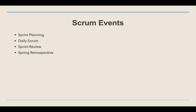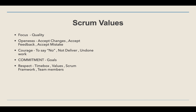The fourth ritual is the Sprint Retrospective, where we analyze what went well, what we can improve, and what unnecessary things we can remove. If we are planning any improvements, we create action items and put them in the backlog, and based on priority we take them up. These are the four Scrum events that any Scrum team should follow. Now, the Scrum values: the first is Focus — we should focus on quality with no compromises. The second is Openness — all team members should be open to each other, accepting feedback, changes, and mistakes.